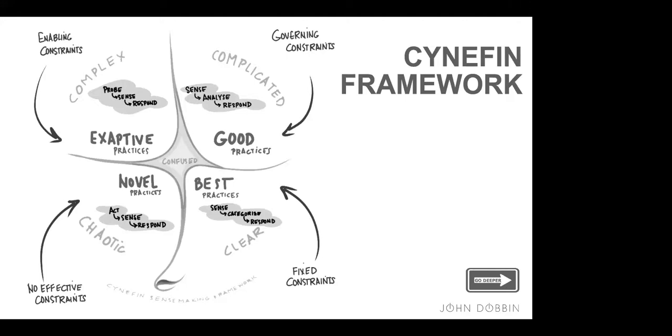Let's imagine that we've got a center of excellence with skilled people that can implement a wide variety of solutions with the technologies that they're skilled in. Sometimes a business owner might come to them and say, this is my requirement. If that requirement is very clear and very straightforward, then that team doesn't need to use Agile. They can just use a waterfall process. It's like a template. They just roll it out.